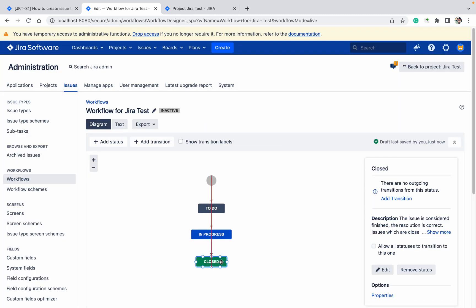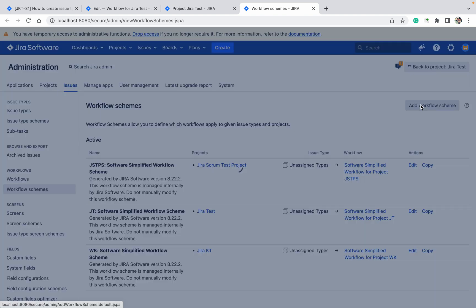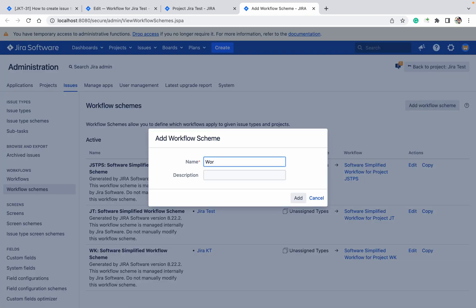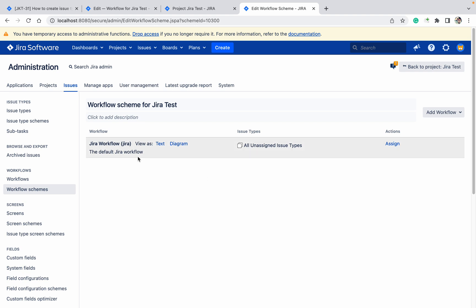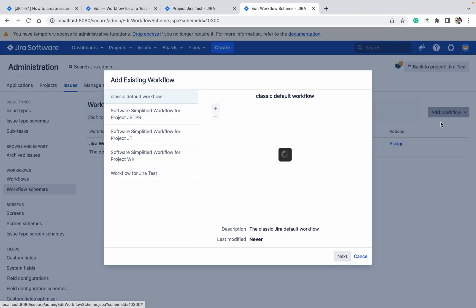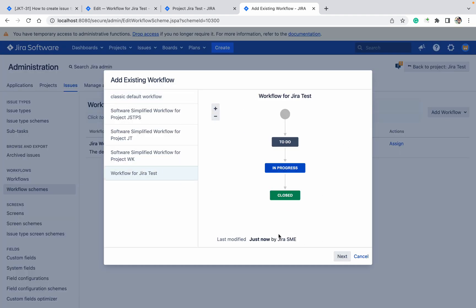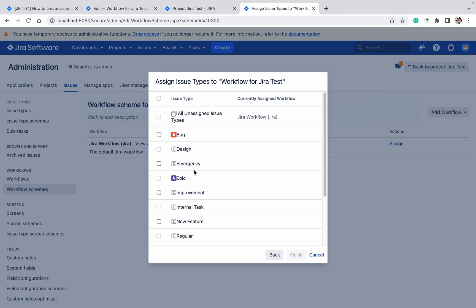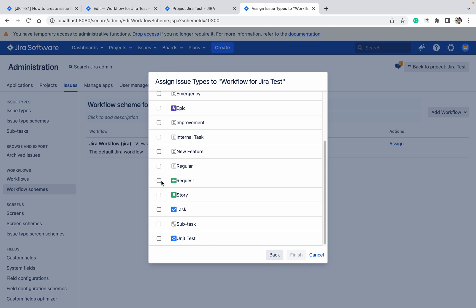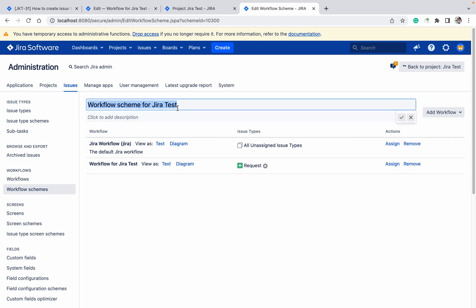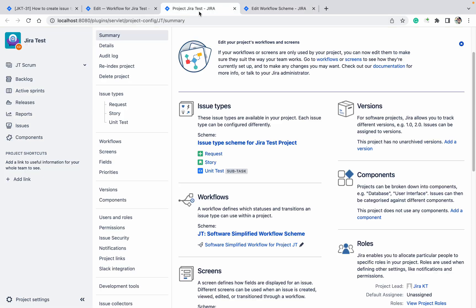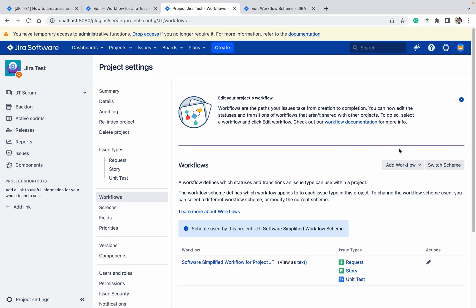The workflow with To Do, In Progress, and Closed is now created. Now I want a workflow scheme. Click 'Add Workflow'. Select the workflow I just created — 'workflow for Jira test' — you can see the name there since it was last modified by me. Select the request issue type and click Finish.